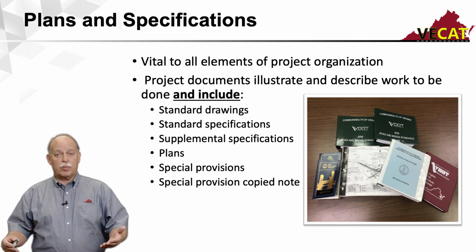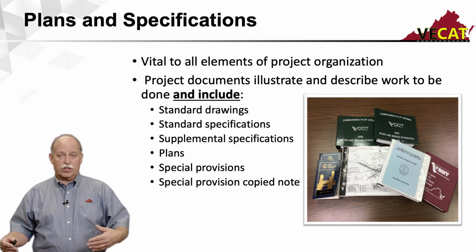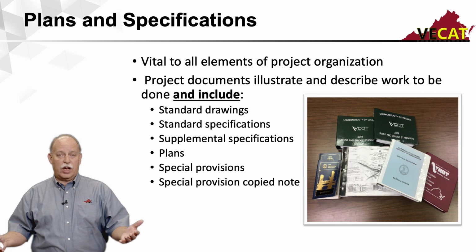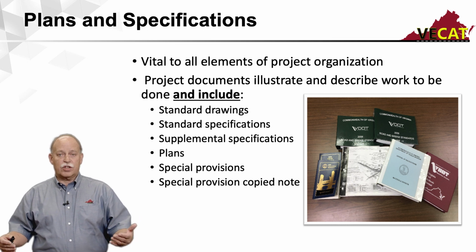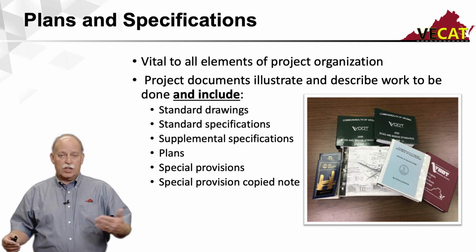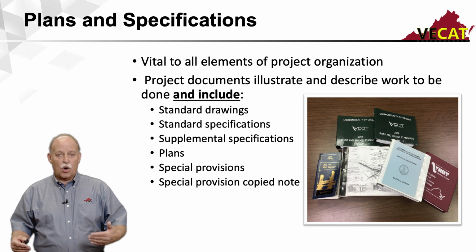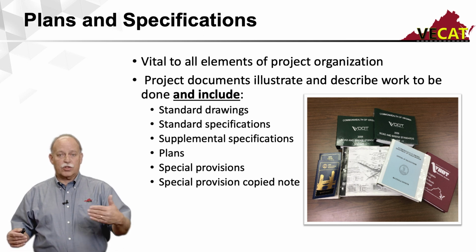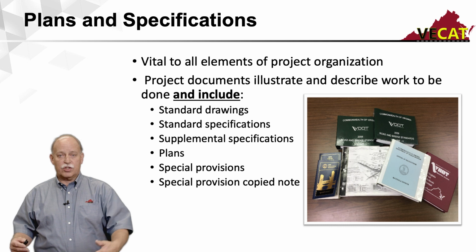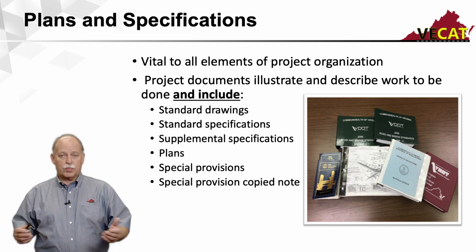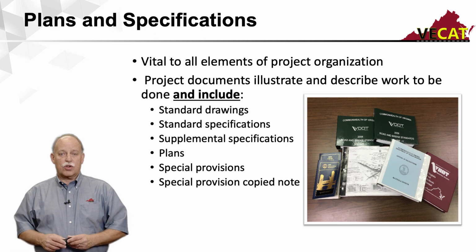So they'll create supplemental specifications. Things obviously change. As soon as the book's printed, things are already changing. So they have to create changes to those specifications. Supplemental specifications are exactly what they say. They're supplemental to the actual standard specifications. They are typically applicable to all projects. So those supplemental specifications are something that you need to be aware of as well.